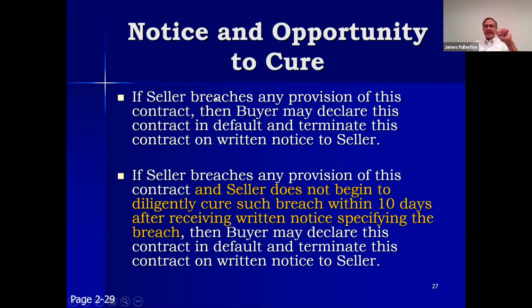Here, any breach, you're in default and can be terminated. Here, any breach, you are not in default unless you are provided written notice, not just notice, but written notice. Not just written notice, but the written notice must specify the breach. And you're not in breach unless you fail to diligently begin cure within 10 days after receiving that notice. Now, this protects you.